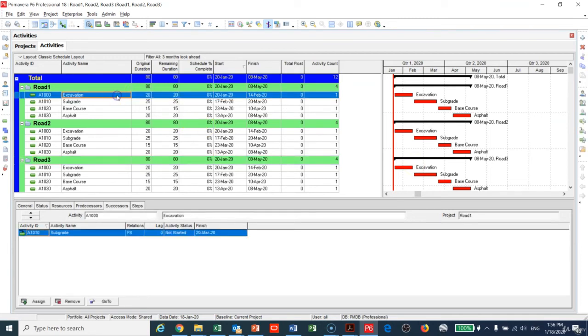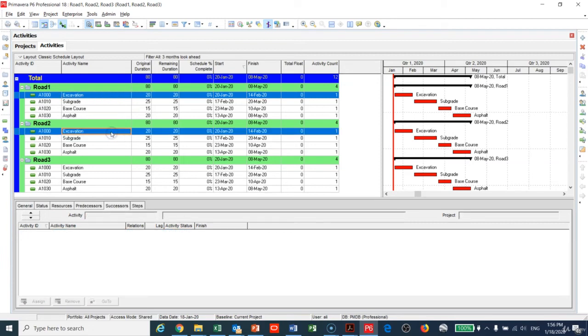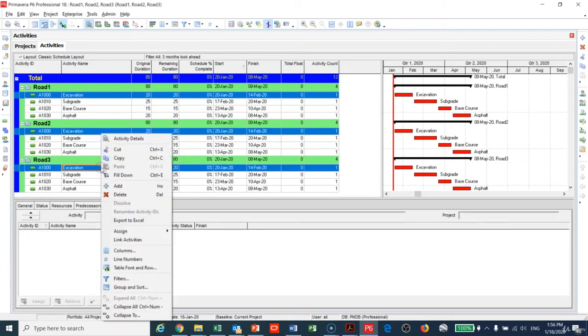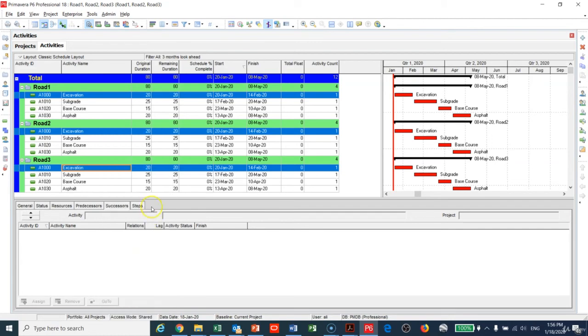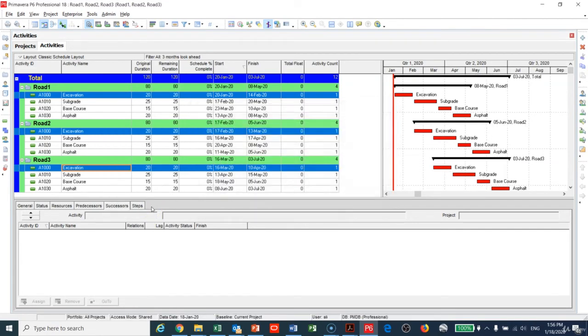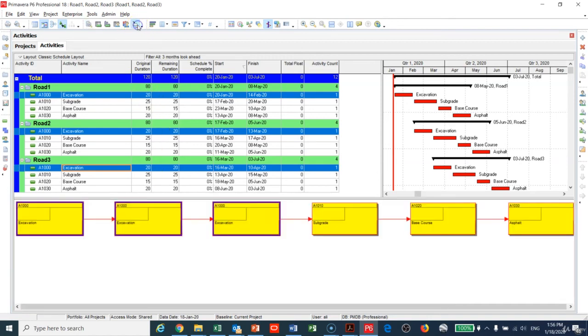In an easy way, choose Excavation of the first project to be tied to the second project to be tied to the third project. I will right-click and Link. After that, after you do any of that, you have to make F9 so that you can see the relationship.